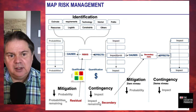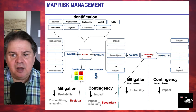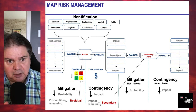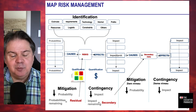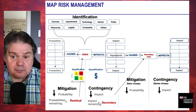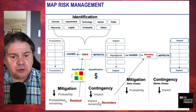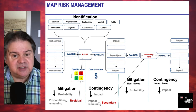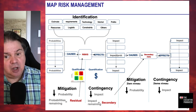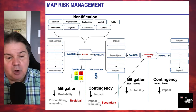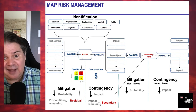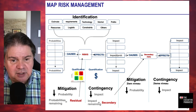Once we've identified a risk — which is usually an event — there's nothing you can do with the risk itself. For example, if I go into a presentation at a conference, I have a risk that my remote control doesn't work. I can't do anything with the remote control not working. I need to understand the cause that would make it not work, and what the effect is. The cause could be a dead battery — now what's the probability of this happening, and what's the effect?